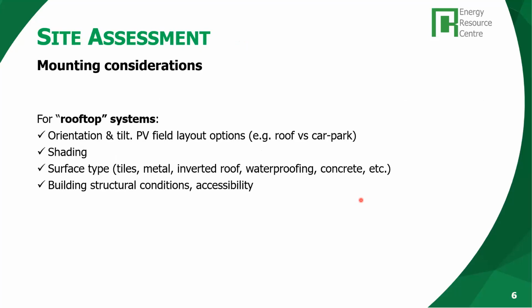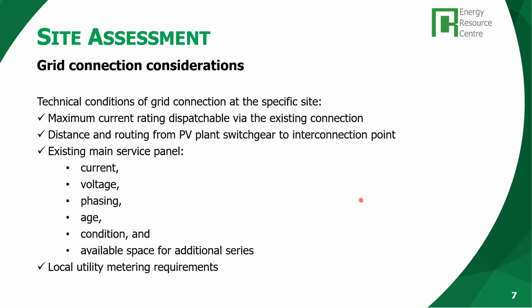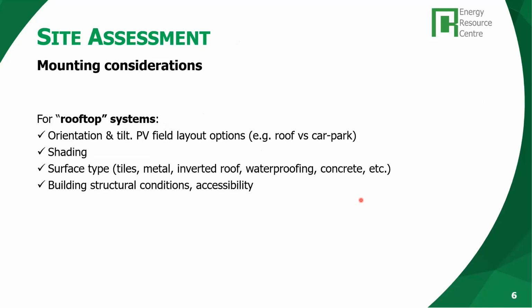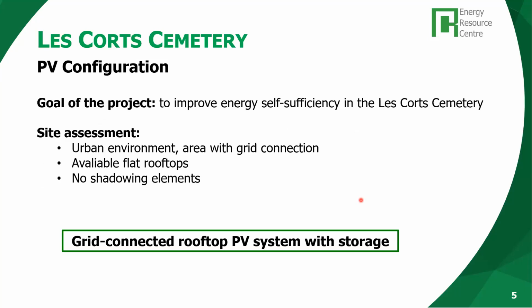The installation was developed in a public tender format, and the engineering works, which are the drafting of the executive project and the construction management and the implementation, were tendered separately. I was in charge of the team responsible for the drafting of the executive project and the construction management. Like Paul said, in 2014, in Spain, it was a bit difficult to do photovoltaic systems because we had a lot of restrictions in the law. And this is the reason why we decided to do this kind of installation.